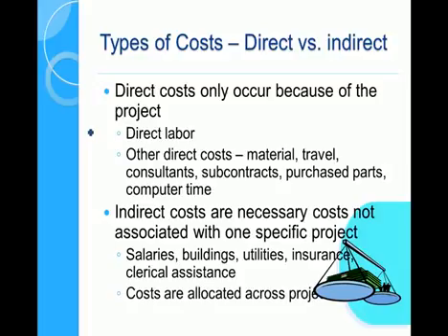Indirect costs are the overheads. They would be related to multiple projects. So the cost of having an office would be allocated across multiple projects. There are different ways of doing that, but typically organisations have a percentage estimate of what the overhead is. So every dollar we spend on direct costs might mean about 30% of indirect costs. So things like the office staff salaries, having a building, maintaining a lease, the insurance that occurs across multiple projects, all those are indirect costs. They're not actually related to this project, but they're related to all the projects an organisation may undertake, and that's allocated across those projects.